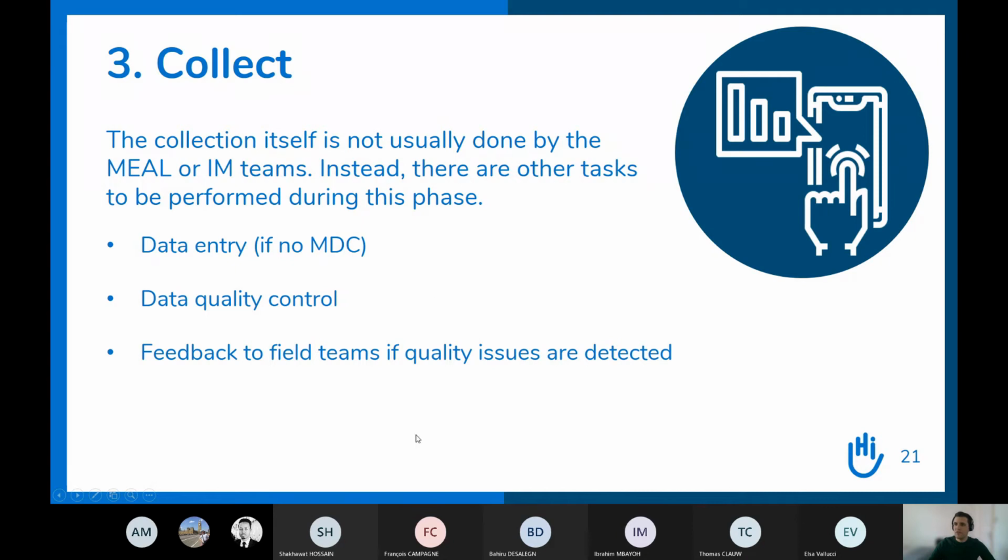So it's really important to start to enter the information and control the quality during data collection and not at the end of data collection, because usually when you do quality control, you are going to identify some problems. You are very lucky if you have a database that is 100% perfect with no error at all. So if you identify mistakes in the database while the data collection is still ongoing, then it's still potentially possible to correct this data.